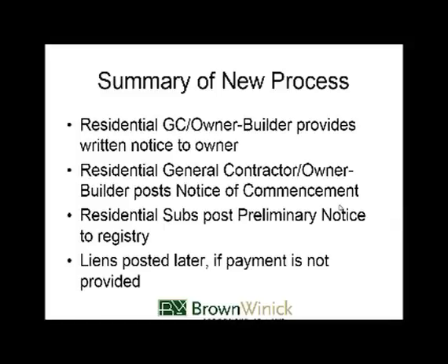The notice requirements and everything else still flow to that project just like anything else. So a sub who sees that the notice of commencement of work hasn't been filed should still post it and then post their preliminary notice. I wouldn't change anything if somehow the owner or owner-builder gets changed out on the process.